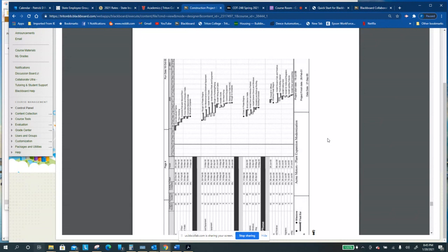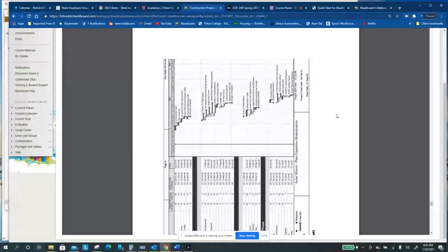If you're on site for 4 hours, you might get much less done because you have setup and clean up, or pick up at the end of the shift. All relationships aren't just linear commodities we can plug in and plug out. My point there is your best resource is the contractors doing the work.